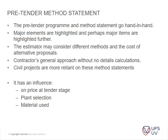Pre-tender method statements go hand in hand with programming. Major elements are highlighted and the estimator may consider different methods and cost alternatives — for example, using a concrete pump versus bringing in tippers or concrete trucks. The contractor's general approach is outlined without too much detail, but you need the necessary details to do the calculations.